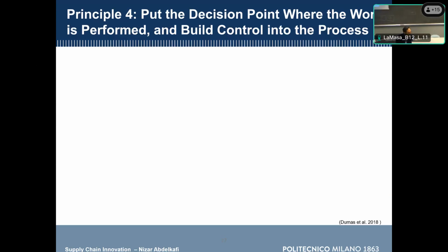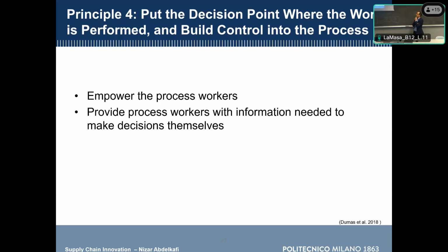But instead of having a 100% check of all rentals that are submitted by the site engineer, we can build some statistical control. Let's say the works engineer can take 20% of the equipment rentals placed by the site engineer and make a statistical control whether it's okay or not. And we know with statistics, we can determine a sufficiently low number so that we can have high confidence that most of the rentals went very well. So instead of 100% control, we may have statistical control. Instead of 100%, it's just 10% control of these equipment transfer requests.